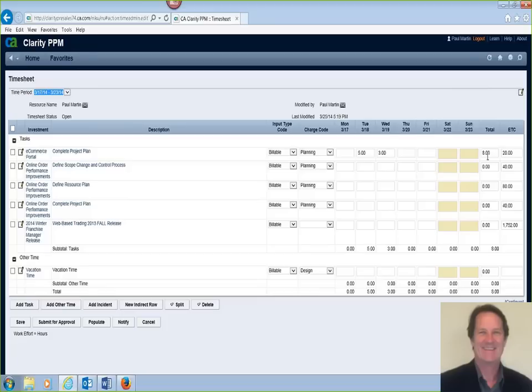There's a couple other pieces of this. I may have put in 8 hours, and now it says there's only 20 hours remaining, but I may realize this is a harder task than I thought. I can actually go in and say there's actually 30 hours remaining in my estimate, and I can save that. What that does is tell the project manager, who will see these updates, that this is a harder task than I thought and that it is going to affect the project plan. The project manager can have that notification and then plan accordingly to manage the project.